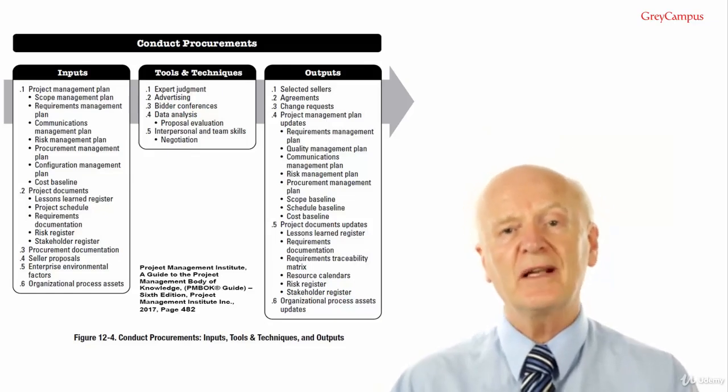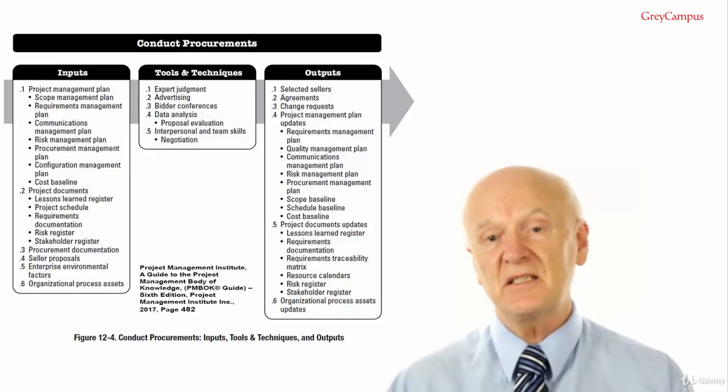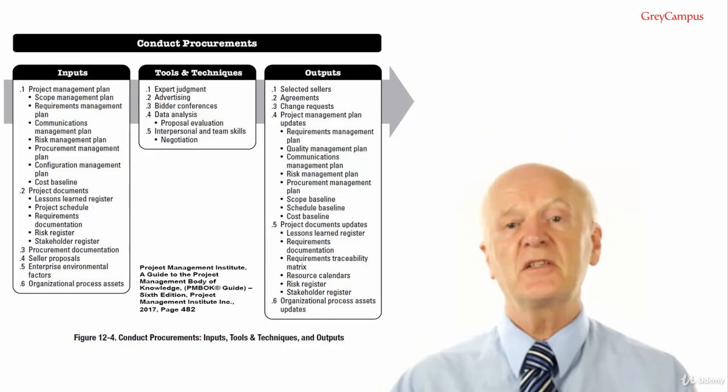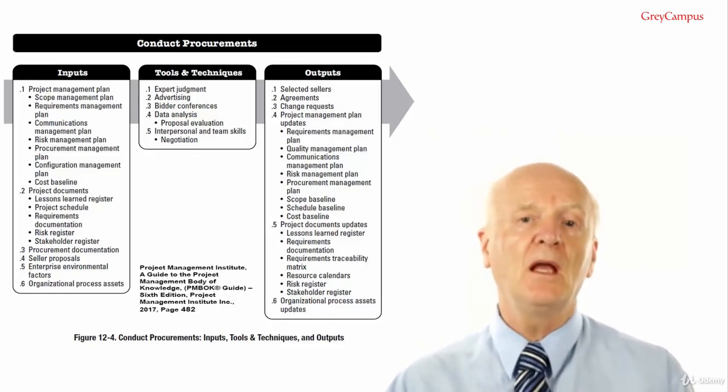Not every contract will allow you to use subcontractors. Some will insist that you don't. Other contracts, they're happy for you to do it whatever way, but you need to have it clear what you're allowed to do. You can't assume.